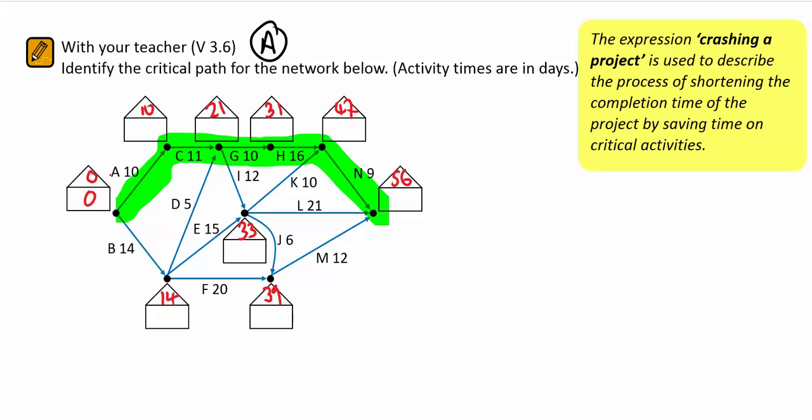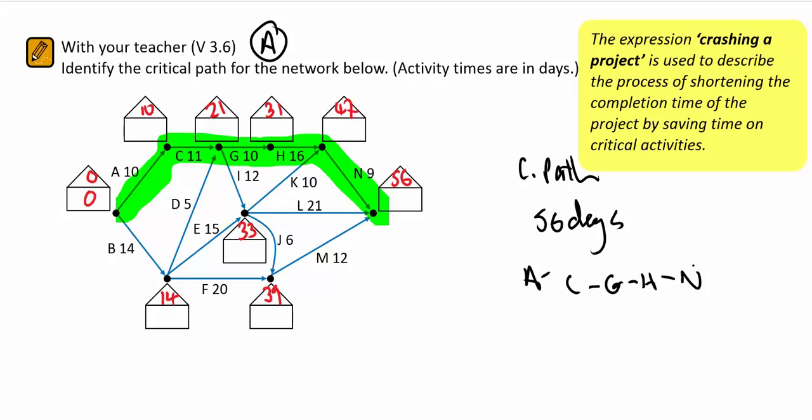So in other words, we've got 56 days, I should really write down. And that will follow the activity sequence and then backtracking or back scanning to put in the latest finishing times. Everything along the critical path has to finish before the next one can start. Now for the activities that aren't on the critical path, I've got a backward scan.